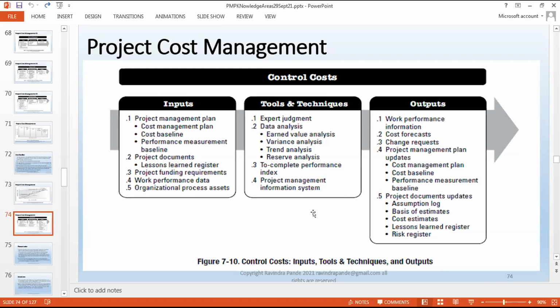The project funding requirements: if I'm going red, or if I have an estimated budget, cost, or schedule for that matter, and if there are certain dangerous changes, it might be something like an unforeseen risk materializing. It might be something like the client adding quite a few change requests in terms of construction, in terms of addition to the project value. Then we might start the project funding requirement initiation by the project financial consultant or by the project managers to the top management and eventually to the client. And this is how the process is followed.